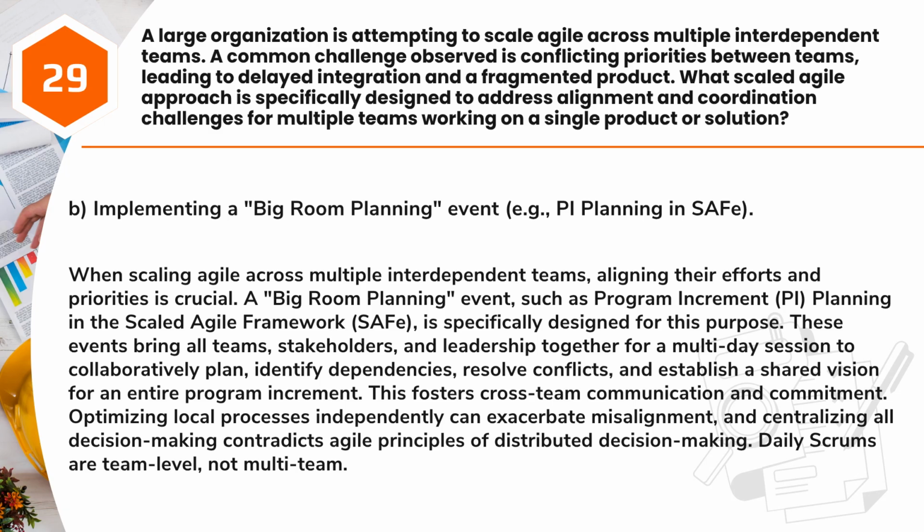for this purpose. These events bring all teams, stakeholders, and leadership together for a multi-day session to collaboratively plan, identify dependencies, resolve conflicts, and establish a shared vision for an entire program increment. This fosters cross-team communication and commitment. Optimizing local processes independently can exacerbate misalignment, and centralizing all decision-making contradicts Agile principles of distributed decision-making. Daily scrums are team-level, not multi-team.